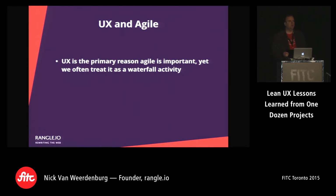There's a great explanation of Agile in a book called Doing Twice the Work in Half the Time, where it takes the Pareto principle, where you get 80% of the value for 20% of the effort. And if you think of what you do in an incremental Agile development model, is you do that first 20%. It's that ruthless prioritization of the most important 20%. You get the 80% of the value, and then you're getting feedback on that 80% of the value, so your next 20% is going to be the most important 20% again. So you're essentially eliminating 50% of the wasted work that you would normally do because you're always focusing on the high value and having that drive the next high value things you work on.